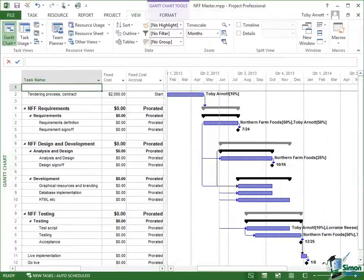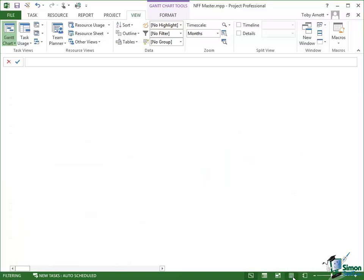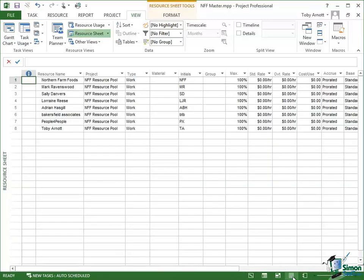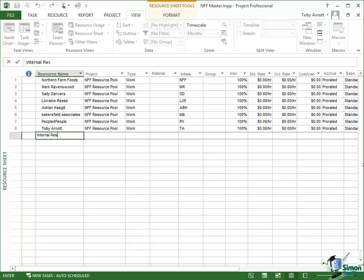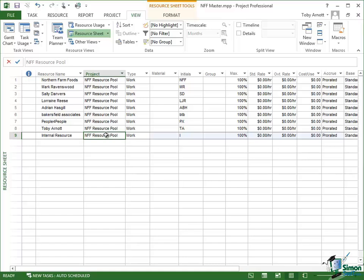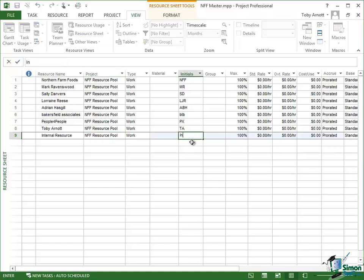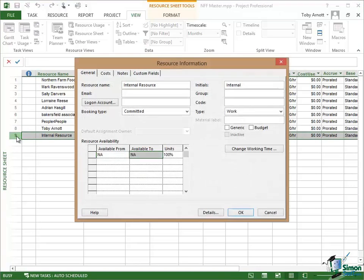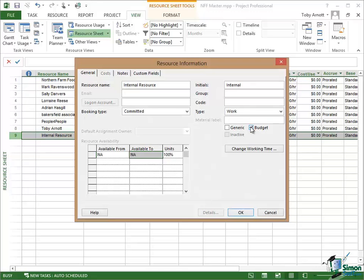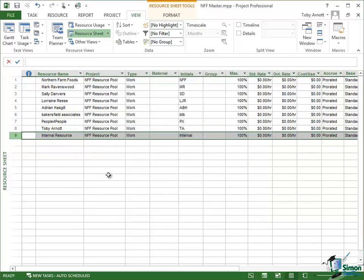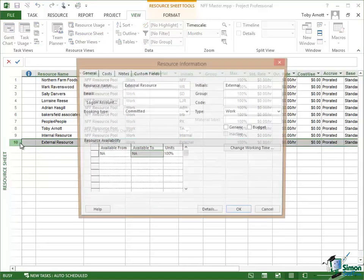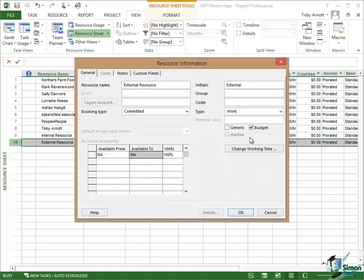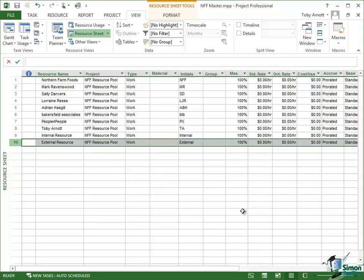So first of all, let me set up my budget work resources. I go to the resource sheet and on there I'm going to add a resource. I'm going to call that internal resource, and it defaults to a type of work. I'm going to call that internal and then open that up and mark it as a budget resource. Click on OK and then add external resource.